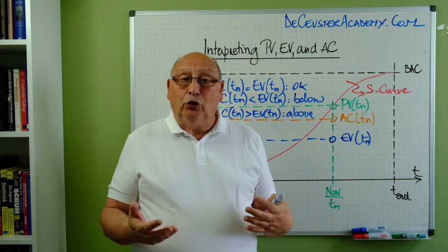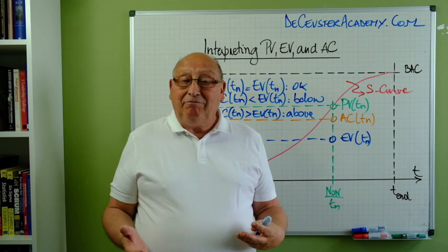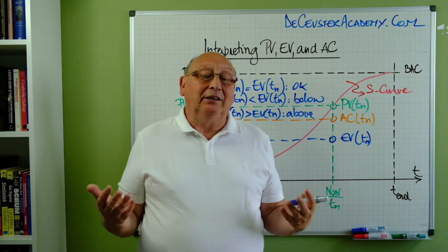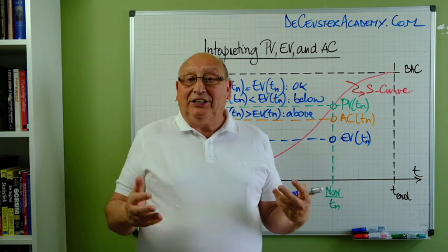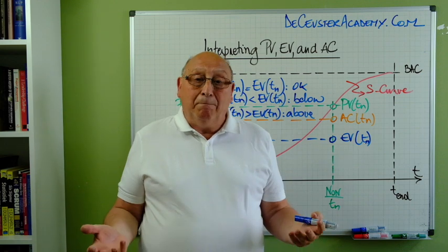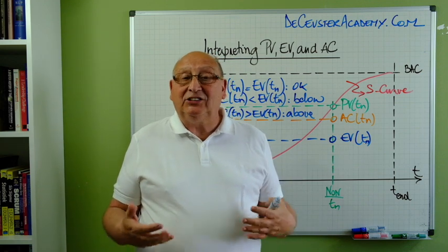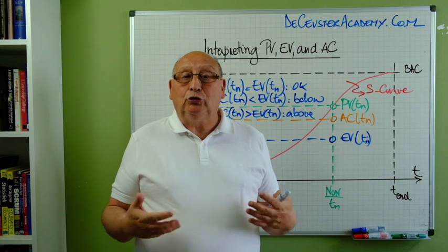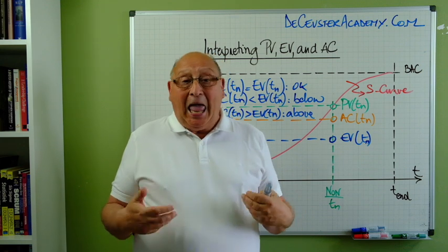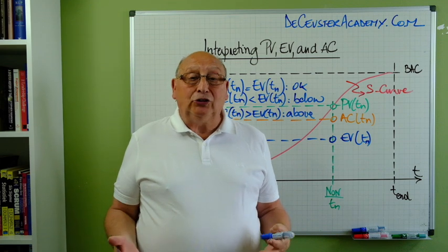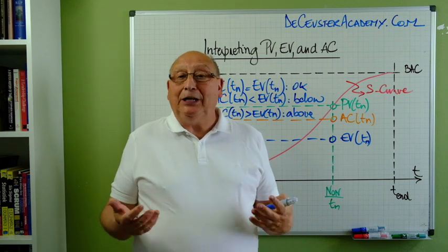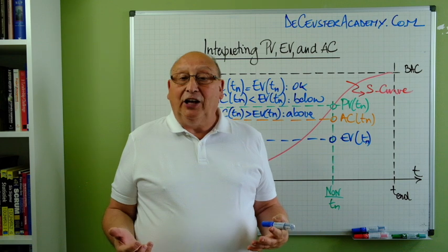Earned value shows us how many deliverables we actually created over the time span, and we transform them to money using the estimates that we used during the planning step. And the last element we are looking at is the actual cost. How much did we actually pay to create the deliverables?